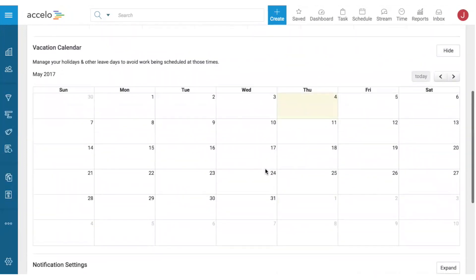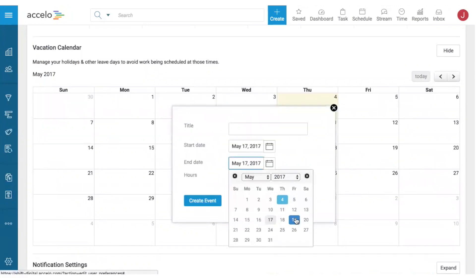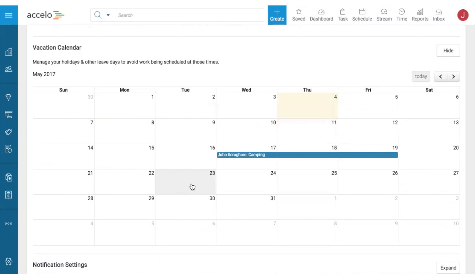You can also set up vacations. If I'm taking time off next week to go camping, the system will either warn when assigning tasks or spread the task time to after my vacation period ends.